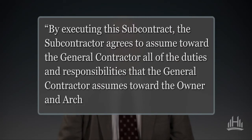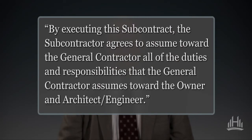Here's a typical example of a flow-down clause: 'By executing this subcontract, the subcontractor agrees to assume toward the general contractor engineer all of the duties and responsibilities that the general contractor assumes toward the owner and architect engineer.'